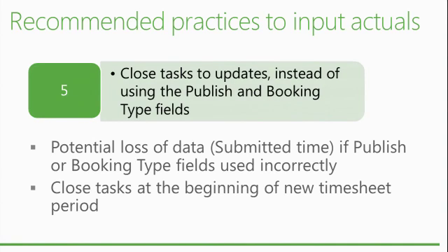Yeah, in this case, they won't use single entry mode because it basically defeats the purpose of single entry mode if you allow them to enter in the task update. So there's no way to have a timesheet only for administrative purposes? Yes, absolutely there is. But then you don't have the lines in there, or you do? You have the lines in the timesheet, they won't be able to... but you have no point of using, in this case, the single entry mode, because single entry mode is really meant to automate the process of pushing the timesheet input for the assignments into the task update that are only assignments. The key, JF, is that she should import them, right?